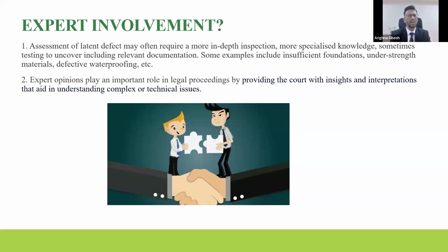Other records can be the financial records of what they are spending, right from the date of the occurrence of the defect till the claim is being generated. So all the financial records. Examples of financial records can include an estimate of the damages at the first instance. Let's say it's a particular building which has already been under beneficiary use, but because of the defect, that building is not being used. So the losses because of that. All these things can be recorded and kept as a particular record.